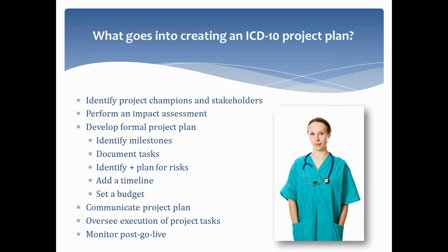So you want to engage your stakeholders. That can be a milestone. Conduct your impact assessment. Identify all of your tasks. That can be a milestone. And then take each task. Each major task can be its own milestone, because each task may have multiple people and multiple things that need to be done to achieve a particular task by a certain time. You might also identify testing, training, go live, and post-go live as milestones that you want to put on your project plan.